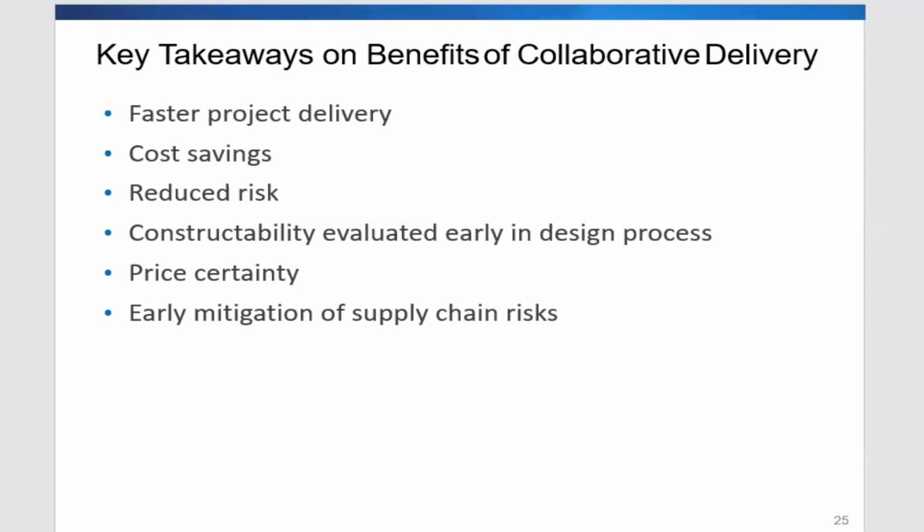And once they win the project at a low cost, they start issuing RFIs, requests for information, just to bump the price up to where they originally wanted to bid, but they just wanted to come in at a low price and win the contract. But with a collaborative approach, all these constructability issues will be looked at earlier in the process, so that there's no chance in the end, when you move into construction, to have any issue with constructability.